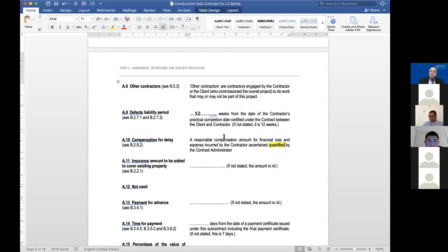So, oh yeah, but because the painting activity, I know it's a painting contract, it's only $5,000. But then, if you're late, my compensation to the client is 1 million. See, so I got to put 1 million. You get all kinds of argument. People challenging what's the amount, reasonable amount, reasonable compensation not exceeding. Oh, forget about challenges. And, oh, it's effectively a penalty clause. Forget all that. Leave it as general damages or unliquidated damage.